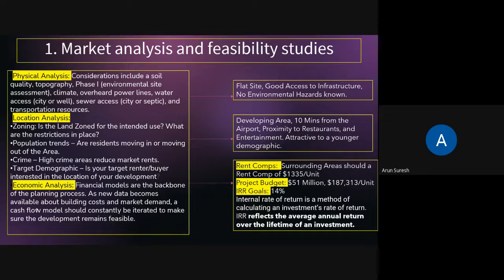For our project, we found the site was flat, had good access to infrastructure — storm, sewer, water lines — so we did not have to do an extensive build-out. There were no environmental hazards like asbestos or contaminated chemicals on site. In terms of location analysis, the site was 10 minutes from the airport, had good proximity to restaurants and entertainment, and was more suitable for a younger demographic.